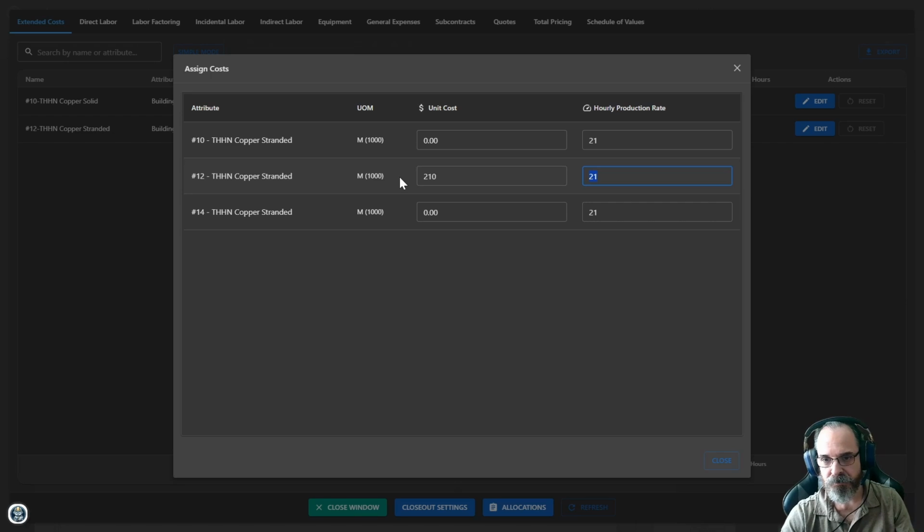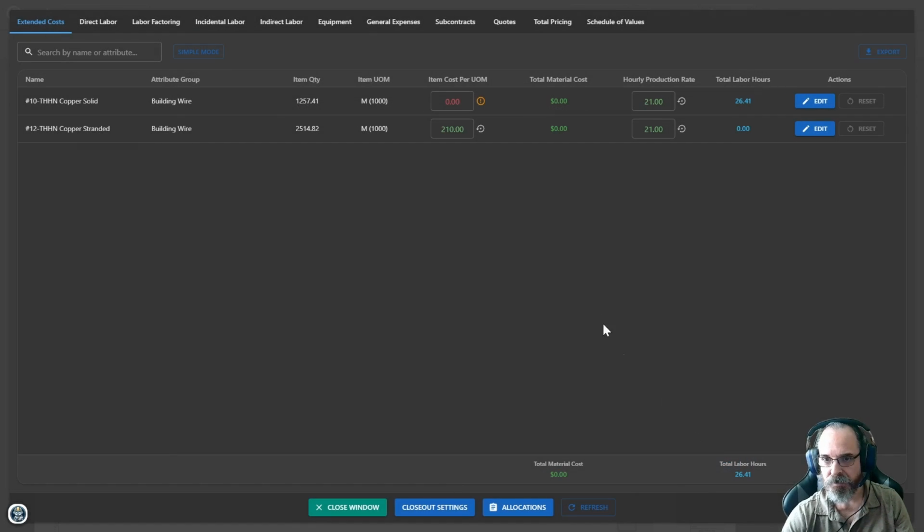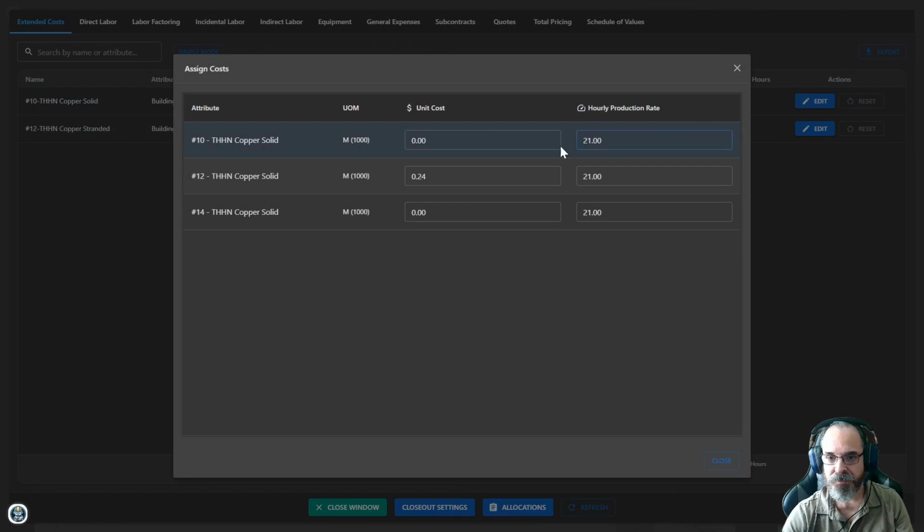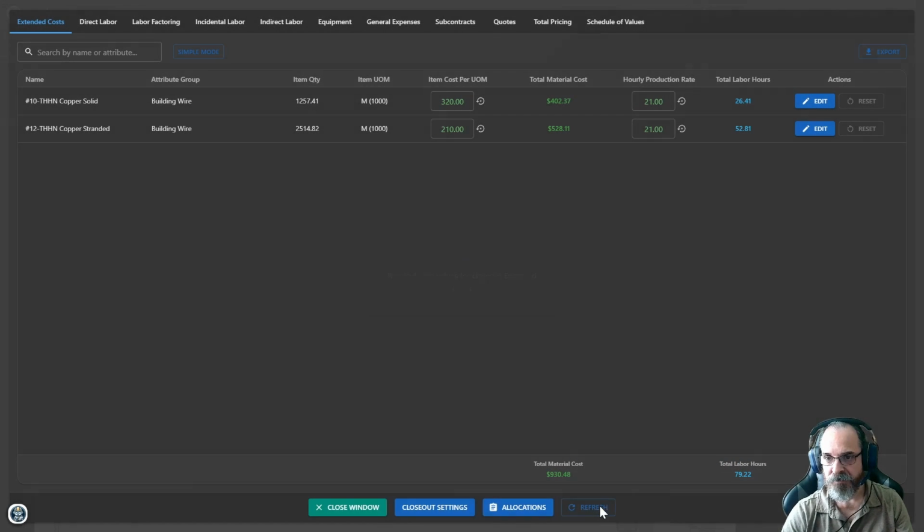Yeah, that's going to be $210, right, for 1,000 feet of that. So I'll hit close, and now I'll hit refresh, and now you can see I have $528 for 2,514 feet of number 12. And this is not a real number, but then we'll say that number 10 is 320. And then let me make this right, 240. We'll hit close, hit refresh. And now you can see we have our total material costs for each of these items added up here at the bottom, $930 and 79 hours of labor.